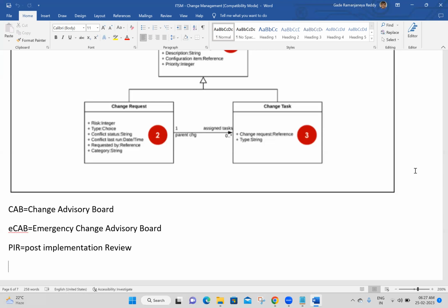Everybody got it? If you create a change request, it is not that you simply get approval; before that, we have CAB meetings also. In those CAB meetings, CAB members will discuss a few business things: if we implement this functionality, how will it help our business? For example, if we are removing some functionality with the change request, how will our business look without it? All these things they will discuss in the CAB meetings.